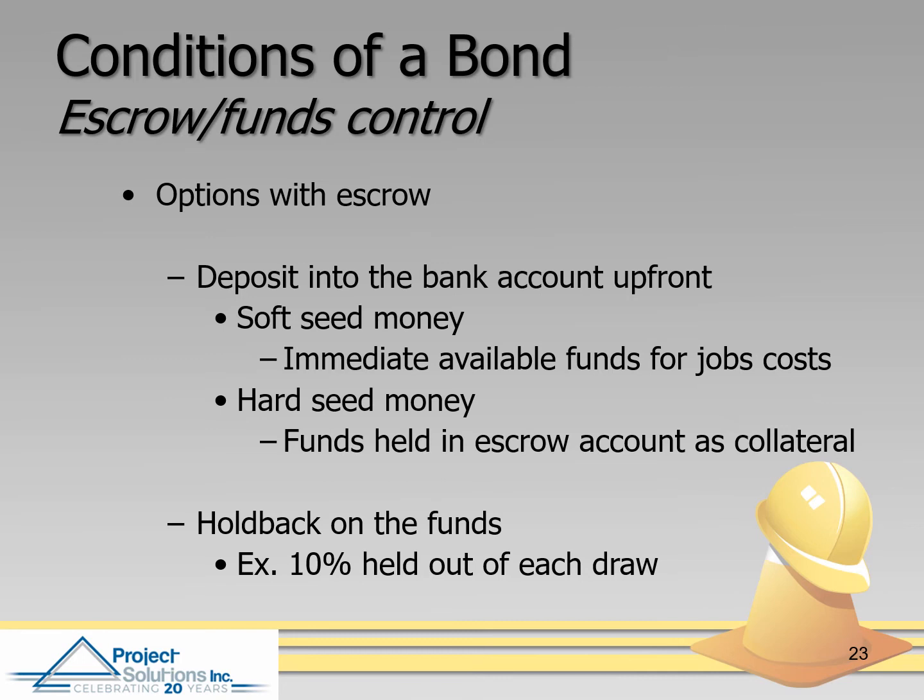So they may deposit some upfront money or hold back some for any rework that has to be done. So just something to be aware of: if you get a bond, you could be required to escrow the funds, and it won't necessarily go directly to you, and they take care of making sure all the other bills get paid.